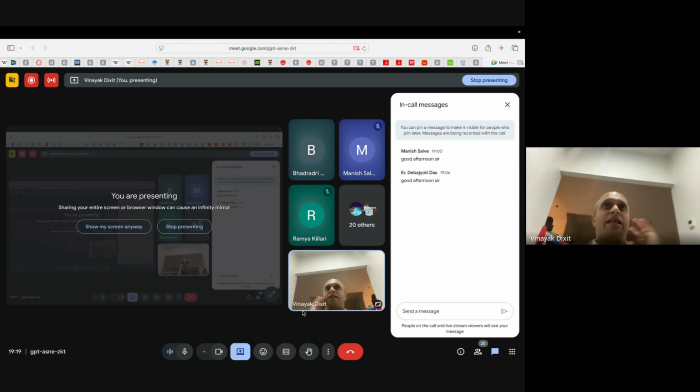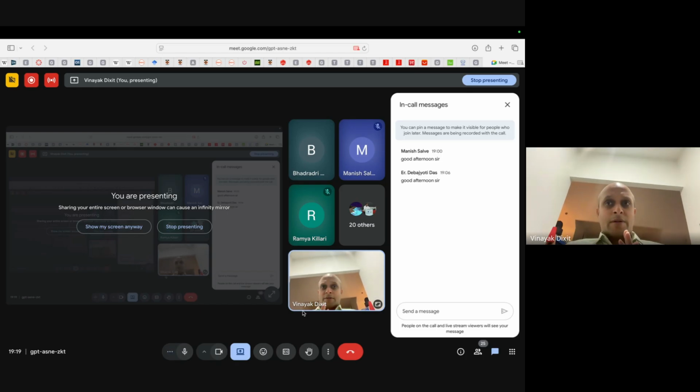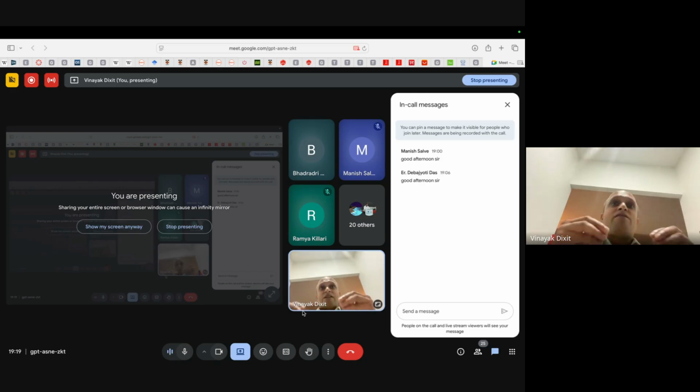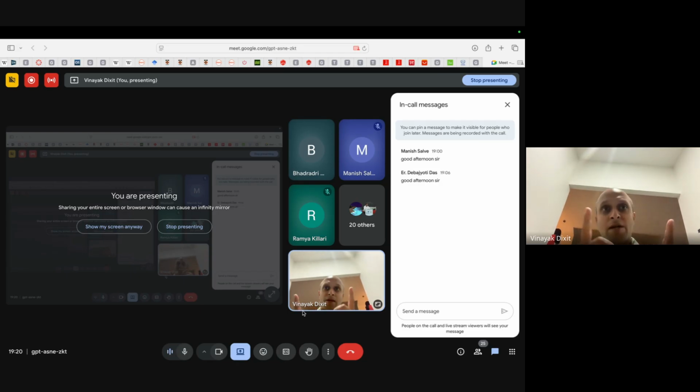So we then do heterogeneity of value of time based on these different groups, or we just take an average value and do an analysis saying that, look, we understand that there's heterogeneity, but we'll take this one value, and this is an assumption which we all agree to for the purposes of our prioritization. Once we have all agreed to that, that's basically what the results will say. So a lot of these choices around these parameters are a matter of agreement to all the stakeholders.